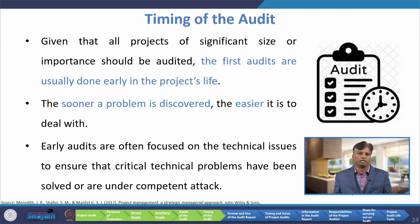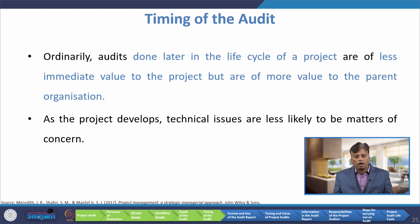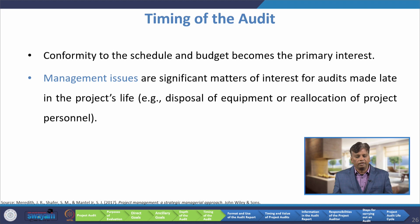Given that all projects of significant size should be audited, the first audits are usually done early in the project's life. The sooner a problem is discovered, the easier it is to deal with. Early audits are often focused on technical issues to ensure that critical technical problems have been solved or are under competent attack. Ordinarily, audits done later in the life cycle of a project are of less immediate value to the project, but are of more value to the parent organization. As the project develops, technical issues are less likely to be a matter of concern. Conformity to schedule and budget becomes the primary interest of any audit activities.